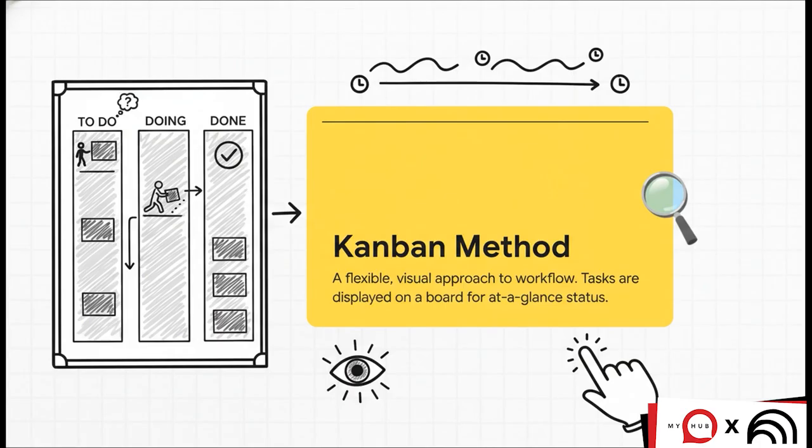And last but not least, Kanban. Hey, if you're a visual person, this one is for you. It's so simple. You use a board, physical or digital, with columns like To Do, In Progress, and Done. It's an incredibly easy and flexible way to see exactly where everything stands with just a quick glance.